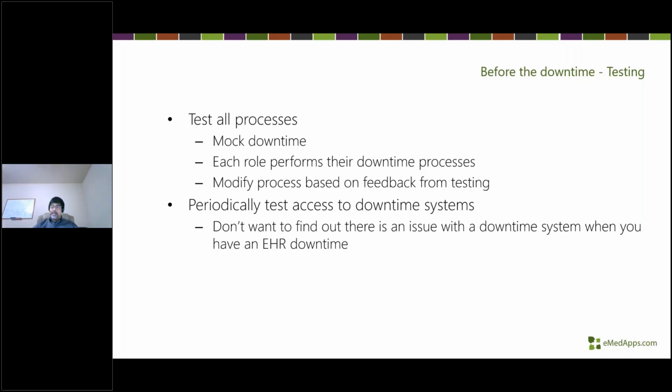But that may change based on changes in your environment. So you introduce a new system or a new process into your practice that may require changing the downtime procedure. Well, then you need to go through that process of putting together the plan based on that new workflow, that new system that's brought into place, and then go through a testing of that plan when that occurs.